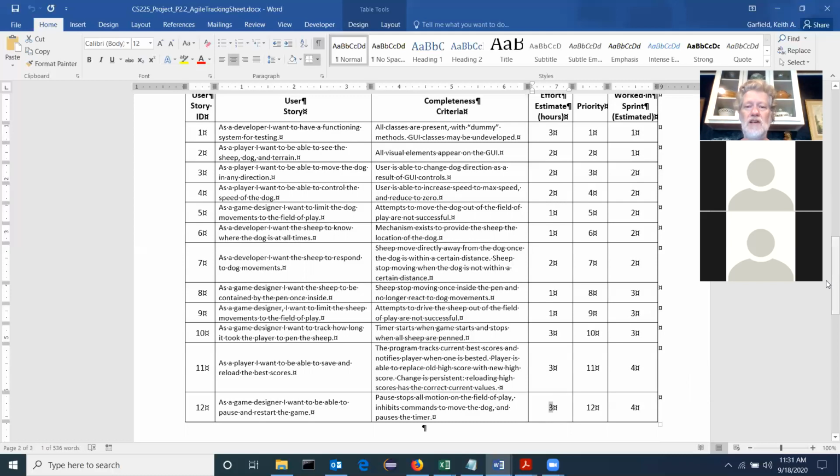As you're creating these, you have a notional idea of what the design might be. Like I just gave you what I think my classes will be, and it's okay to be wrong. These are just good estimates. Now, how do you get to where these estimates are really accurate? You spend 10 years in the software industry. You know how it is when you're developing software. The thing you thought was going to take an hour might take 5. The thing you thought was going to take 2 hours, maybe it only took an hour. Unfortunately, the first example is the one that always happens.